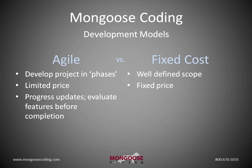The biggest difference between the models is the scope definition. Under the fixed cost model, the scope is very well defined before starting the project. Under the Agile model, the scope is partially defined before starting and partially defined throughout the project.